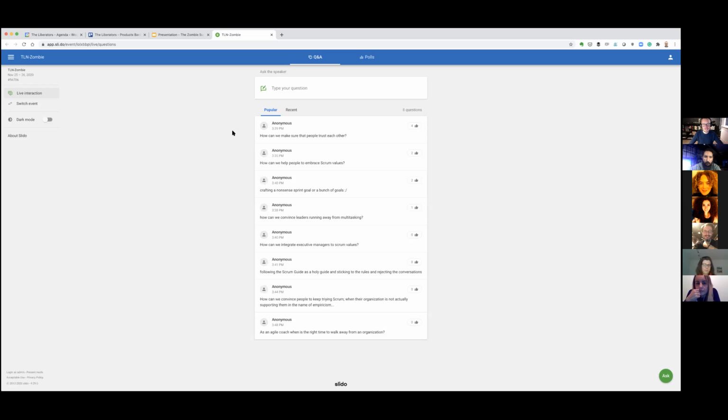So what you could do is, and I think there are tons of liberating structures or experiments that you can use, help them create transparency about the state of the team so that they draw the conclusion like we could benefit from a bit more trust, but that they are also the ones to determine how this could be done. And this might sound a bit vague, but to make it more tangible, a liberating structure like TRIZ could work out. I'm not sure how familiar you are with liberating structures, but you could try TRIZ. You could try Discovery and Action Dialogue, which really focuses on what are the root causes of what's going on in our team.